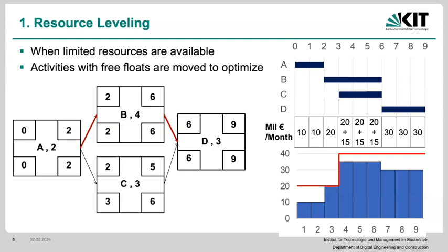And then if it really isn't satisfied and it's a hard constraint, then we have to look at some of those other activities that are on the critical path that need to be moved around, right? And that would increase the time and the duration of the project. However, if meeting these resource constraints is a hard constraint, then that's the cost that we have to pay for it, right?